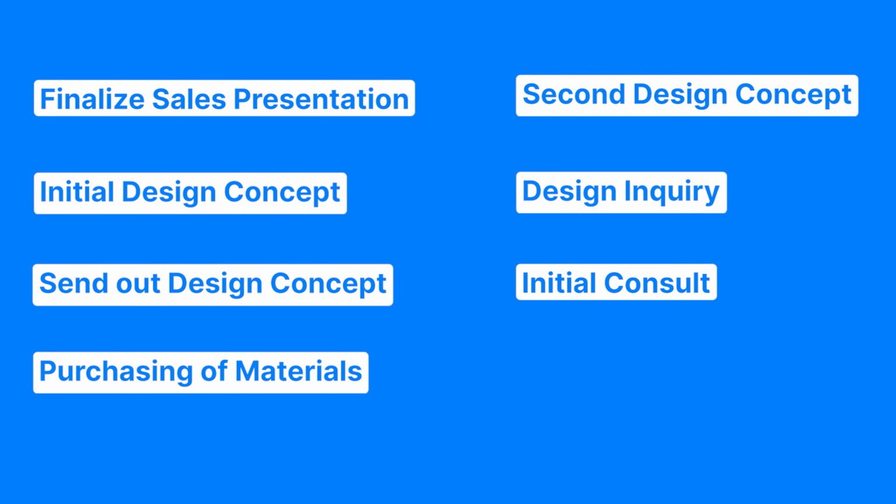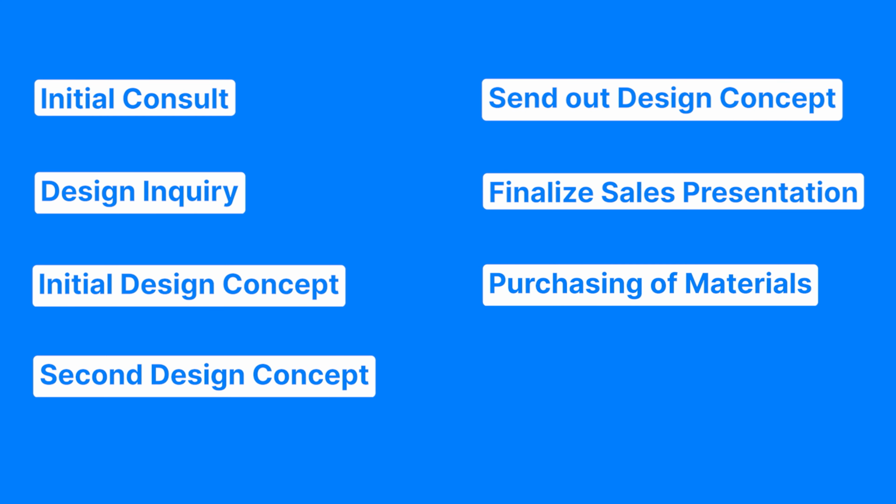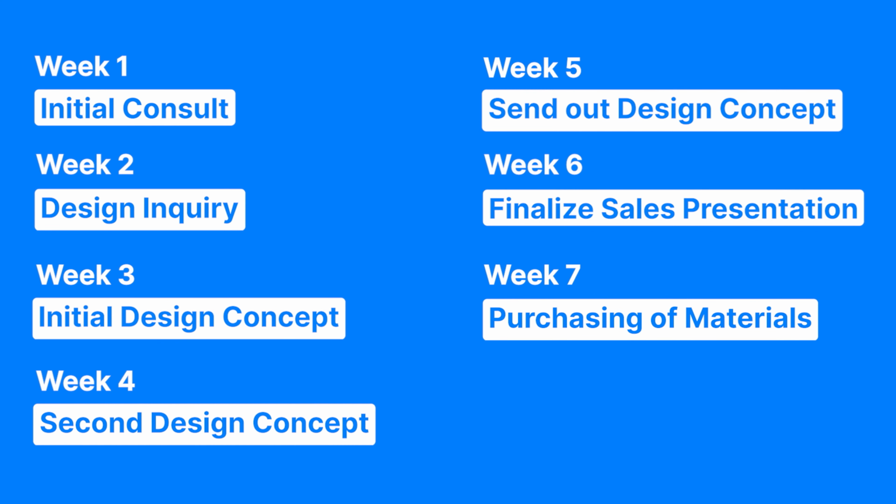To create a perfect timeline, first identify and outline deliverables in the form of tasks. Second, organize these tasks with hierarchy in mind to establish the flow of the timeline, and remember to arrange each step with its corresponding date or time. Once completed, it's time to customize the template.